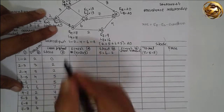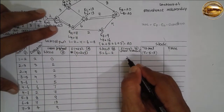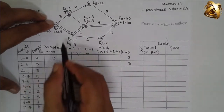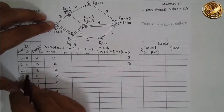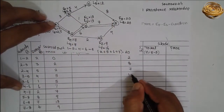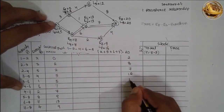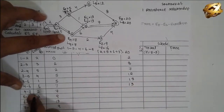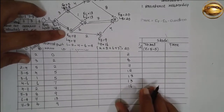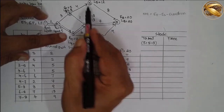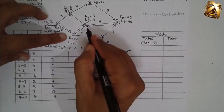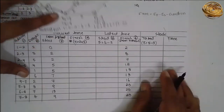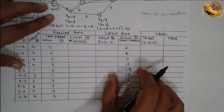Latest finish times from the diagram: activity 1-2 is 2; activity 2-3 is 8; activity 2-4 is 7; activity 3-5 is 12; activity 3-6 is 13; activity 4-6 is 13; activity 4-7 is 16; activity 5-8 is 20; activity 6-8 is 20; activity 7-8 is 20.